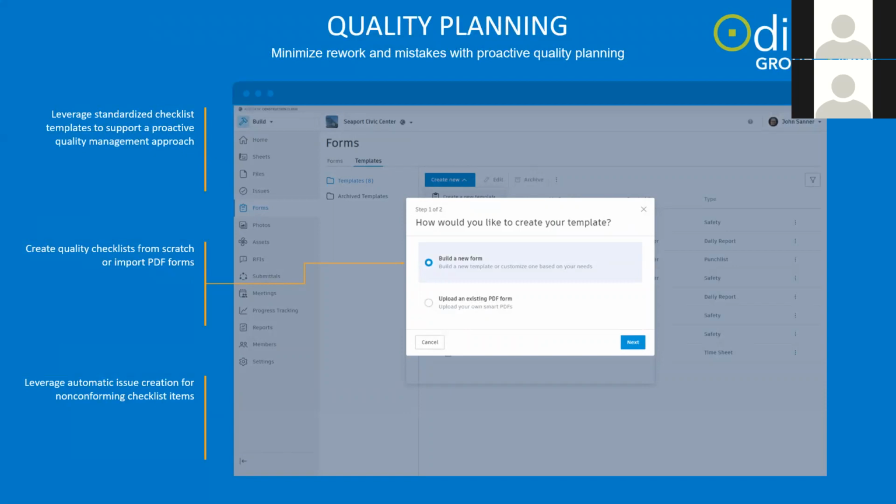So it gets moved from within the Autodesk Construction Cloud, and then somebody on site, whether it's the BCAR inspection or maybe the structural engineer doing their inspections, can use this checklist to create quality assurance on site, making sure that particular items or tasks have been executed as specified. Even from a safety point of view, having your safety officer go around the site and check that particular safety issues have been addressed or should be addressed, and then assigning that in a checklist to maybe the site manager or the foreman on site to address that particular safety issue.